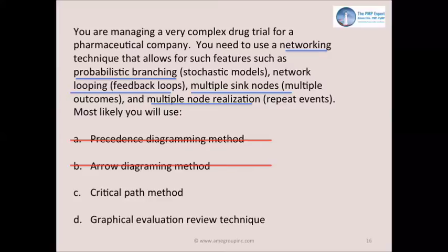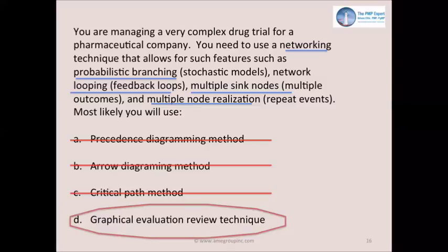When we talk about the critical path method, the critical path method is not a networking technique. It's a technique when we develop the schedule to understand floats and durations. So answer C is wrong because it's not even a networking technique. Therefore, answer D is the only acceptable answer. Graphical evaluation review technique. Sometimes it's abbreviated GERT,